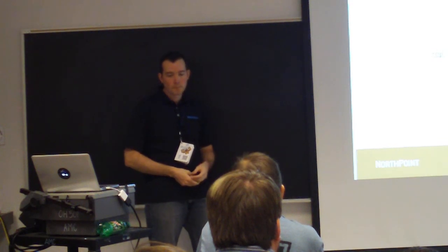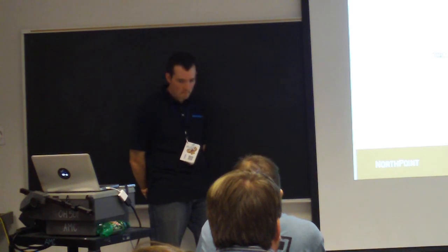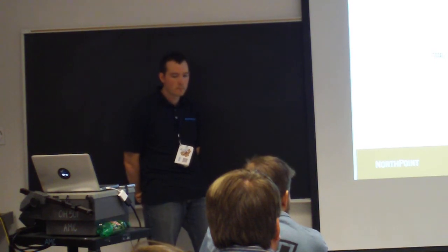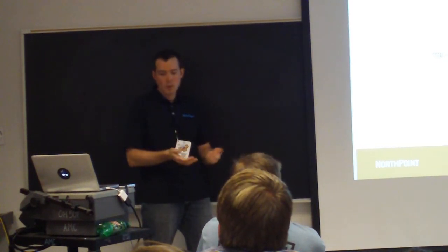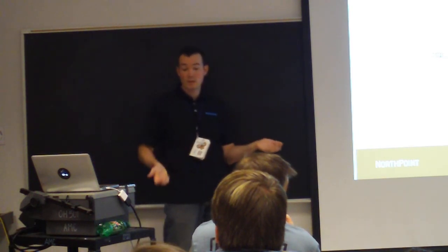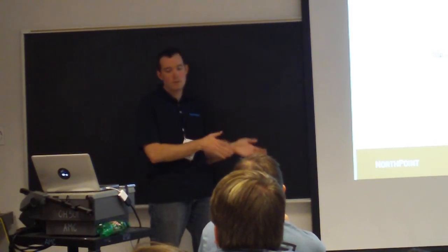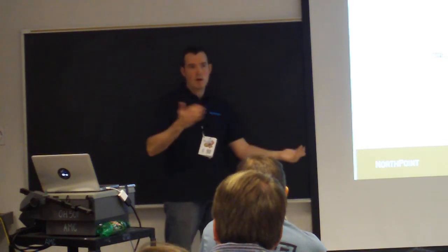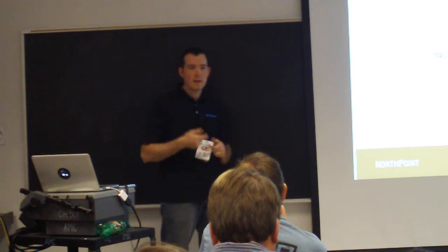That was my follow-up question: if you do, what kind of deliverables do you create up front for those that consist of a waterfall approach, so that you can translate those to a Drupal development team? Generally, if I have to create the requirements document, I'll create a fully vetted requirements document. It'll go through a whole approval process back and forth. That usually takes weeks. In the meantime, my lead developer or myself, we're creating all the user stories based off that document. As bad as that might sound, it's actually a good approach because you have two sets of documentation. They both have to match each other, with user stories and actual written documentation.